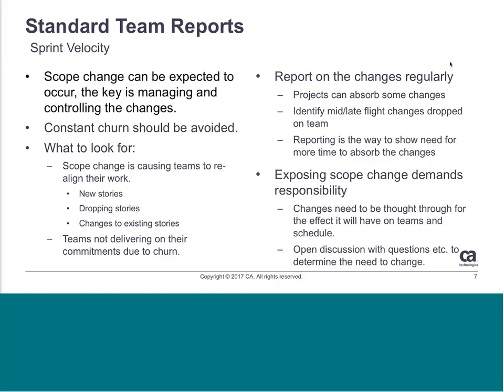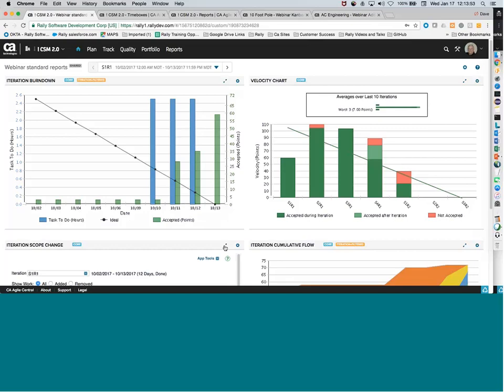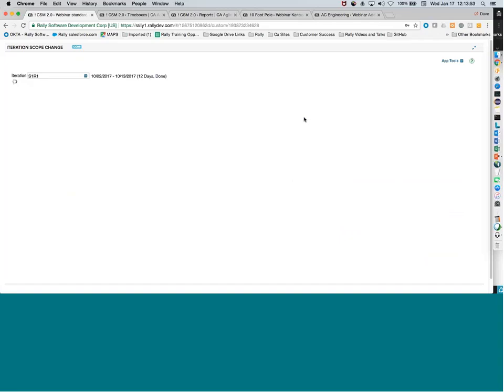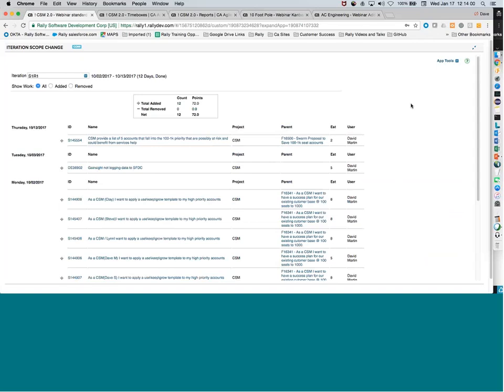So the lead time report shows us essentially the time it takes for a work item to pass through my entire process, from start to finish. So it includes the wait state, while it's sitting idle, waiting for something to happen. And the idea is that we want to use these lead times to help improve the process. So if we see we're sitting in a particular state or taking too long to get through, we may want to make some adjustments to the flow in order to have that be a little more efficient and get items through the process a little quicker.